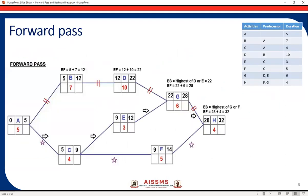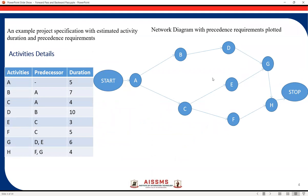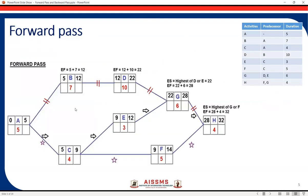We have already seen the node structure. The same network diagram is drawn here with the different node structure. In the node structure we have the activity name and the duration, and in this forward pass we have to calculate the early start and early finish for all activities. We start with the first activity. Since no start date is given, we'll assume it as zero. So the early start for the first activity is assumed as zero.